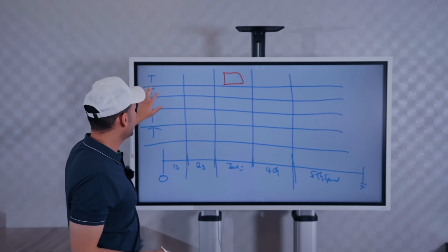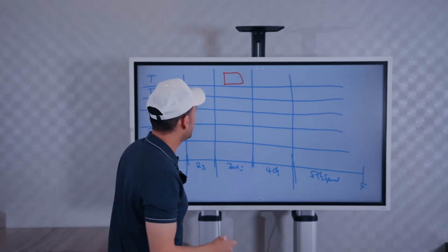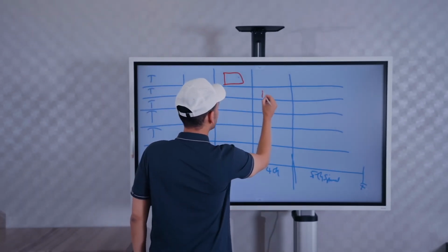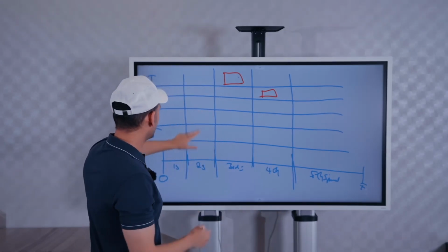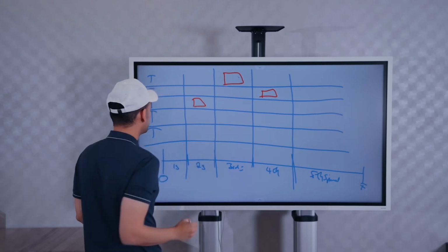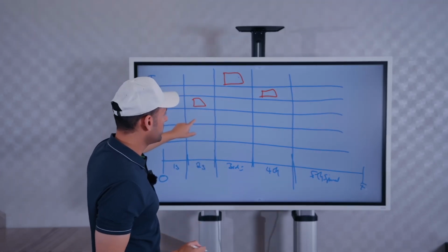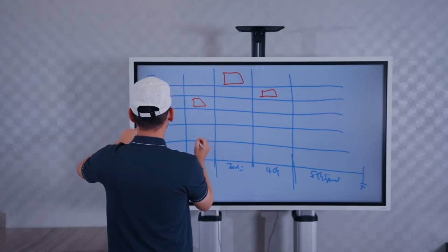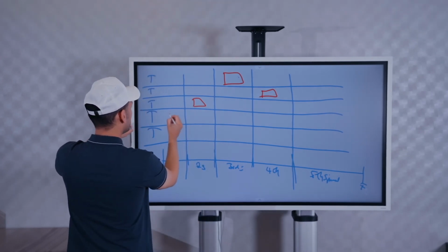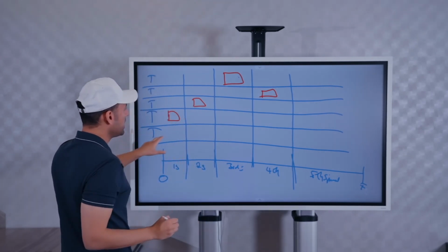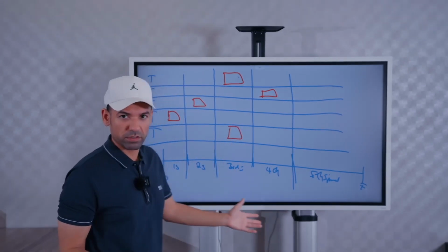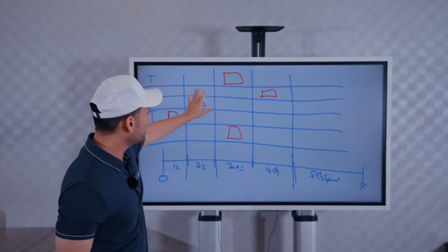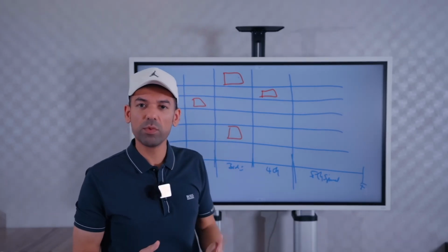Excellent. Let's go to team number two, that they're going to deliver this by the fourth sprint. Excellent. The third team, they're going to deliver something by the second sprint. The fourth team, they'll deliver something by, let's say, the first sprint, because we have nothing getting delivered here. And this team will deliver at the same time. Excellent, good. So now we can see here, there's a bit of a Gantt chart.